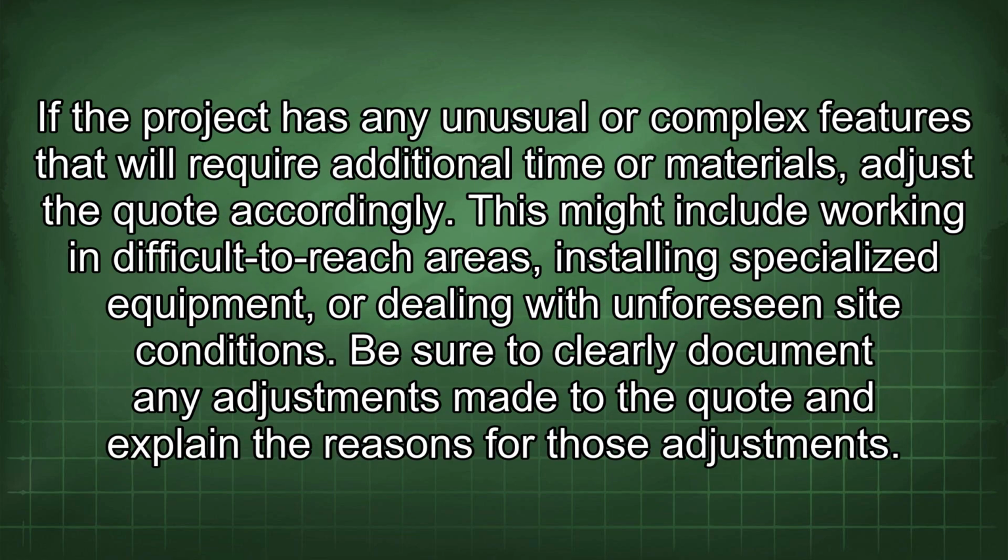If the project has any unusual or complex features that will require additional time or materials, adjust the quote accordingly. This might include working in difficult-to-reach areas, installing specialized equipment, or dealing with unforeseen site conditions. Be sure to clearly document any adjustments made to the quote and explain the reasons for those adjustments.